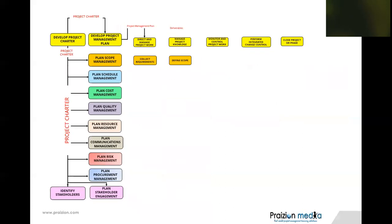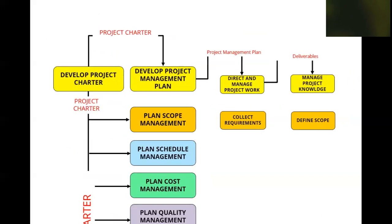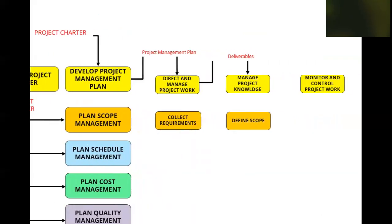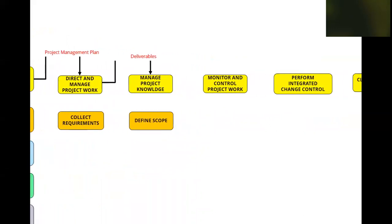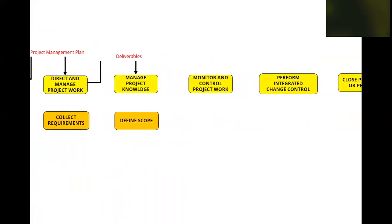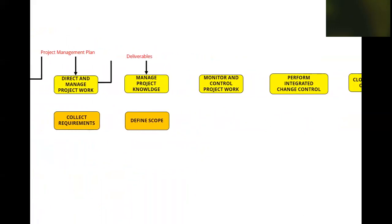Now, let's move on to the next one. How is direct and manage project work linked to manage project knowledge? Well, right off the bat, you can see there's a relationship here with deliverables coming out of direct and manage project work and going straight into manage project knowledge. You see that?